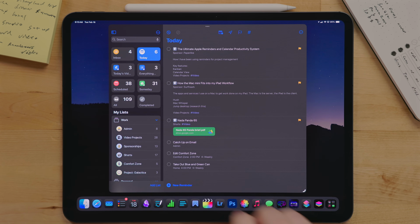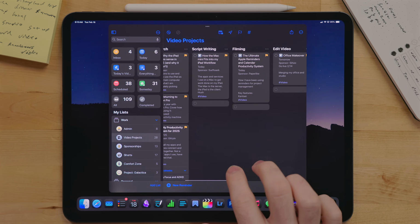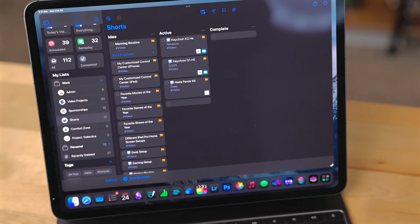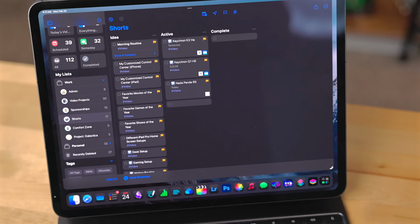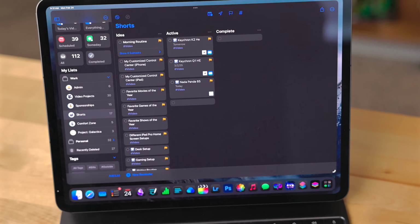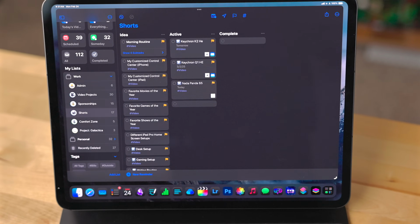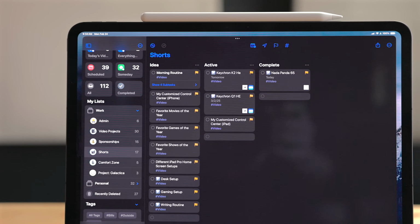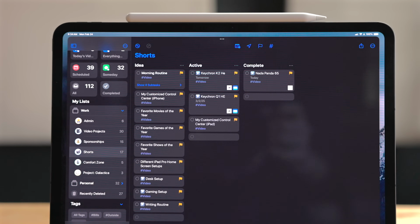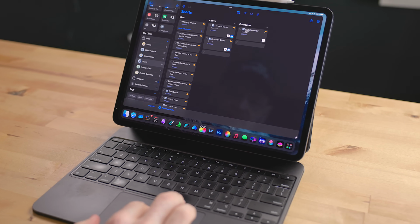In that same menu, you can add more sections. I've built out my video projects and sponsorship lists like this. For those that aren't aware, a Kanban board is a way of laying out different states of tasks in a project. The basic version of this is you have 3 categories: upcoming, working on, and completed. This is a visual way of displaying what needs to be done, what is being worked on, and what is completed. As a task goes from one state to another, you just move it over.